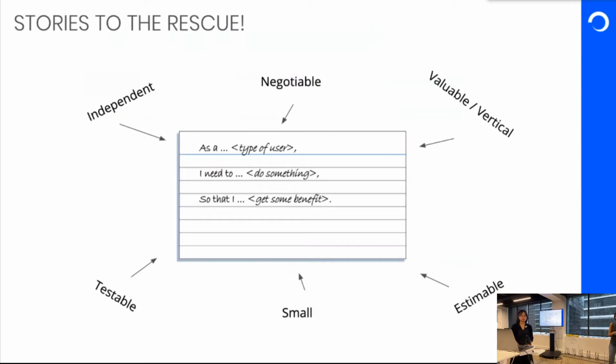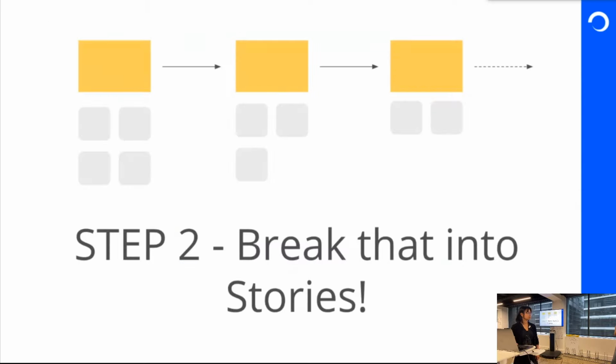I'm hoping that your journey might have a step called coming to the homepage of the site, selecting a particular shoe, selecting the shoe size or the color, and then putting it into the cart, putting in your shipping details and your payment details, and then paying for it. Right? I'm hoping those are some of the steps in your whole journey. You can take these steps and break them into smaller chunks of tasks or stories.